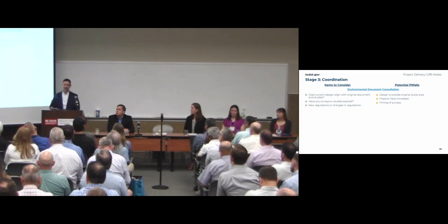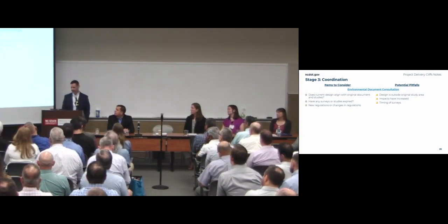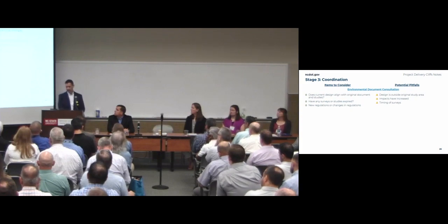If you miss that window, you've delayed yourself potentially 6 months or more, just depending on how that plays out with the survey windows. So look ahead, make sure you're staying on top of those things so that you don't get behind the 8 ball when it comes time to do the consultations and thereby delaying any kind of funding authorization.